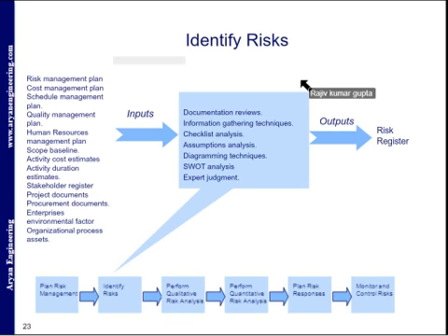And these are our tools: documentation review, information gathering techniques, checklist analysis, assumption analysis, diagramming techniques, SWOT analysis, and expert judgment. And our output is the risk register.